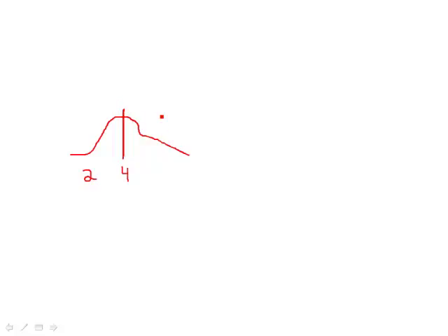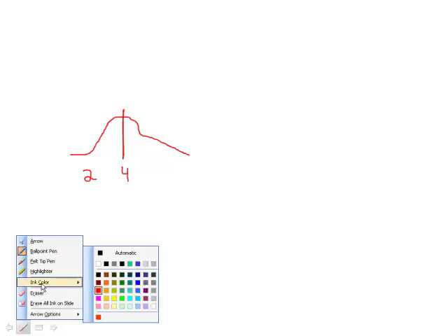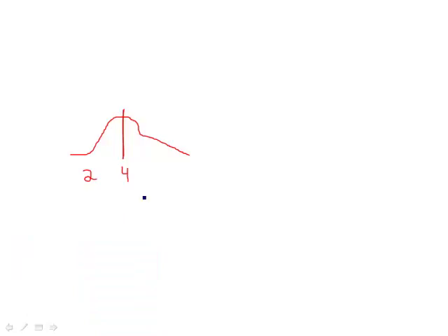That's the properties of the distribution. Let's say that I'm kind of conservative and a little bit risk averse, like most people when it comes to their careers, and I want to give you a time that I'm 85% sure I can hit. So in other words, I've got to find a value that encompasses 85% of the area under the curve.